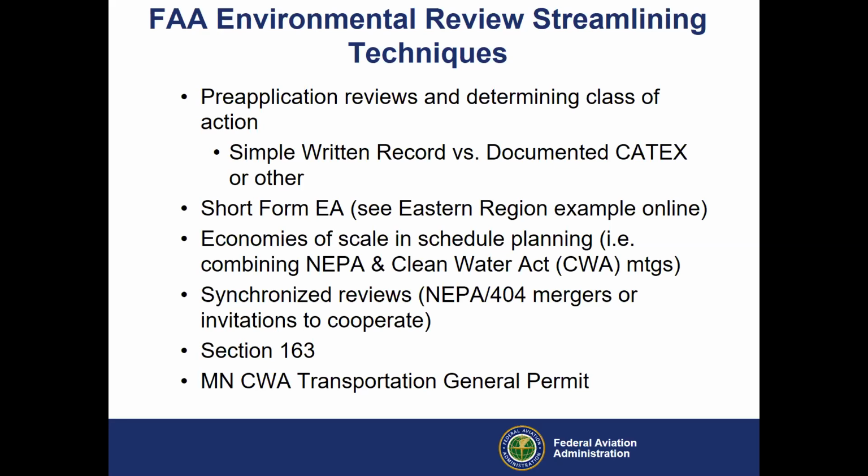If you have an exhibit in that pre-application and a basic narrative that you're staying within that original footprint, not grading beyond, we could issue what's called a simple written record, and that would be kind of our own internal CATEX of that project and saves a lot of time and a lot of money on behalf of the sponsor.